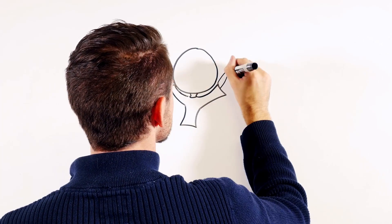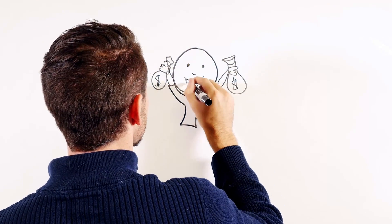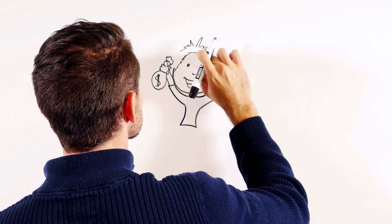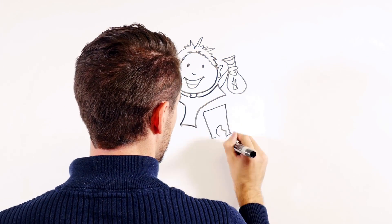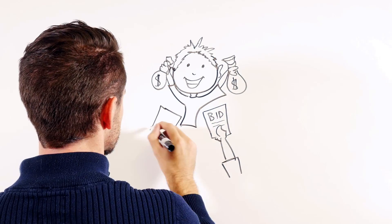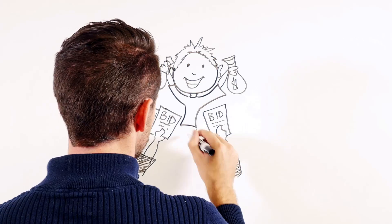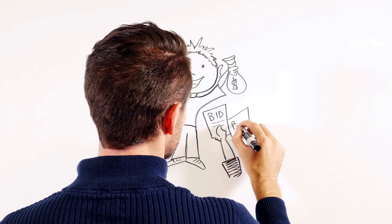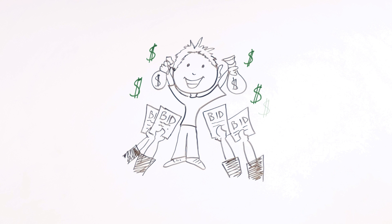Once the drawings and specifications are complete, documents are issued to obtain bids for the new school. This is known as the bid stage. Construction companies, often called general contractors or construction management firms, prepare their bids. Along with estimating their project management, equipment, and labor costs, these firms seek bids from material and labor suppliers. For Division 8, contract hardware distributors will submit their bids — an informed estimate of the cost of the doors, frames, and door hardware, and sometimes their installation as well, based on the plans and specifications.